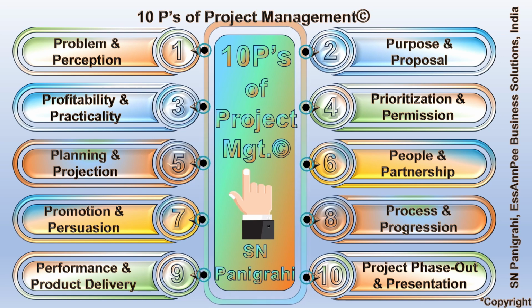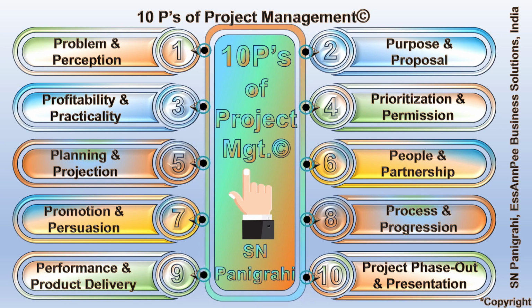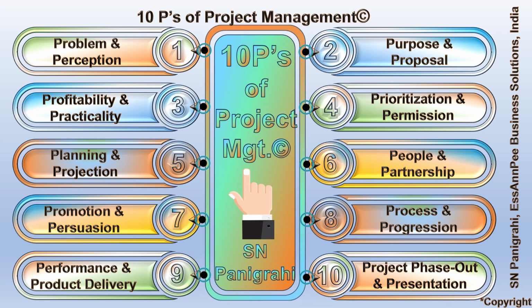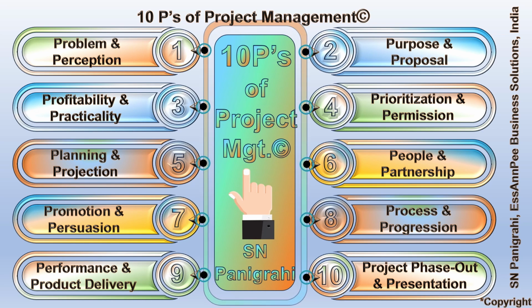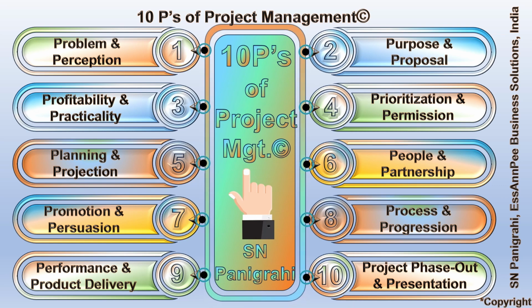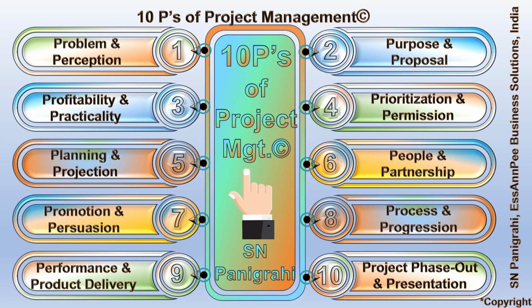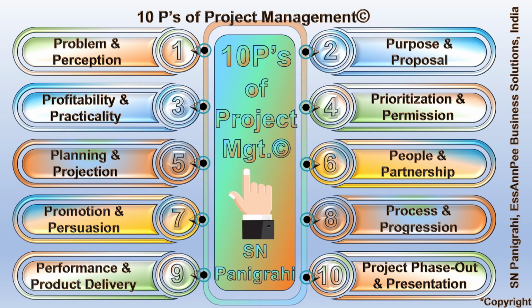While a complete shift to agile methodologies in the construction industry may not be feasible due to the high costs associated with frequent changes in scope and design, a hybrid approach can be highly effective. In the early stages of a project, where the scope is not well defined, agile practices can be employed. This includes collecting and defining scope, engaging stakeholders, and iteratively developing and adjusting plans based on real-time data and feedback. For the remainder of the project, traditional waterfall methods can be used to ensure stability and predictability.